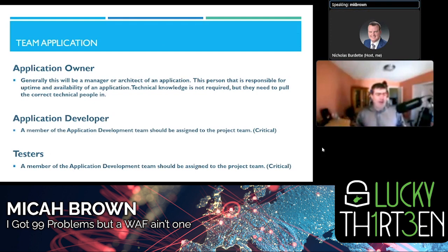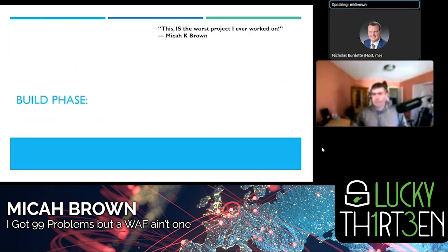So that required us to get with the application developers and the WAF team and find out, was that block really us? And if so, why didn't we catch it in a lower environment? In our case, that functionality was never tested in lower environments, so there was no way we could have caught it. That taught us the lesson that moving forward, we needed to test both diversity of traffic and volume of traffic. And that's going to be a running theme with this talk.